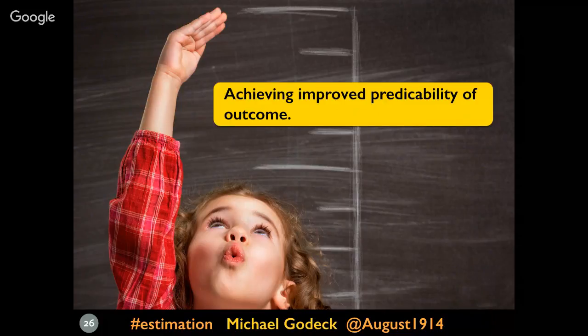Saying that it's a 2-day story doesn't tell you what needs to be done in the story, right? It's not even clear how much of the estimate represents effort and how much of that estimate represents risk or uncertainty. For example, consider 2 stories that are both estimated at 1 week. And one story, it's very clear what needs to be done, but it's going to be a lot of effort, right? It's going to be a lot of lift. And the other story, it's really going to come down to a very small change, but there's a lot of uncertainty about what else is going to be affected. So how does the fact that the estimate is 1 week help you with one story or the other, right? I don't think much at all.